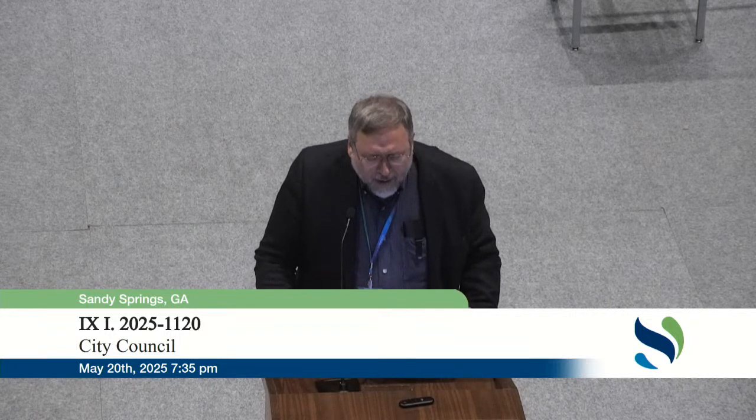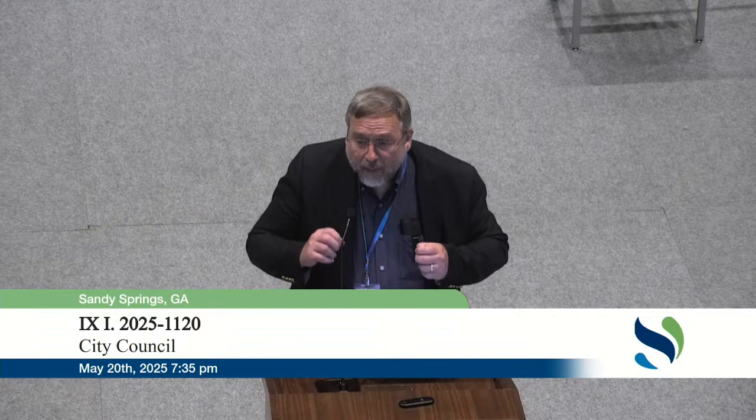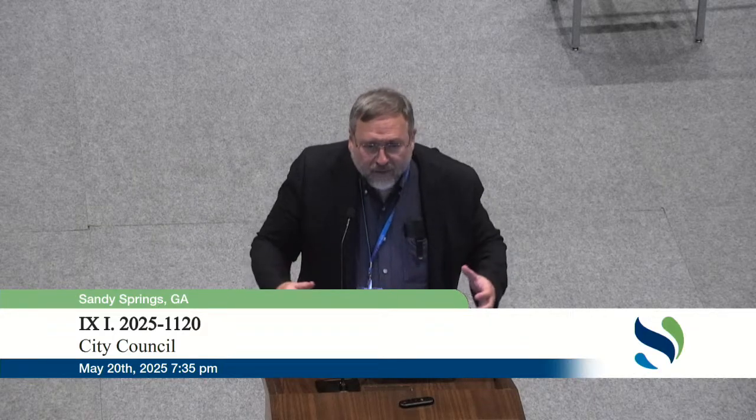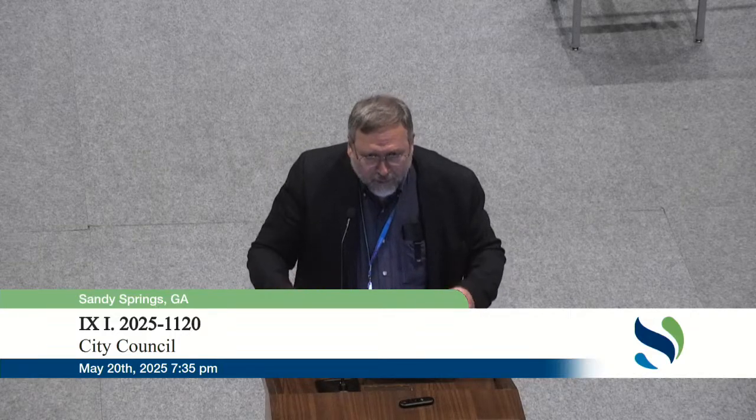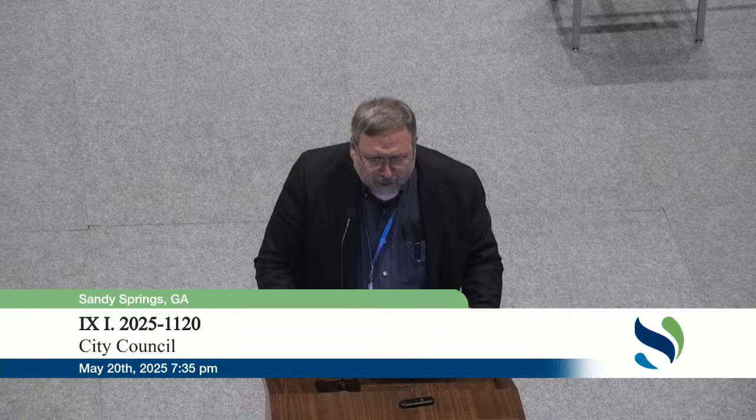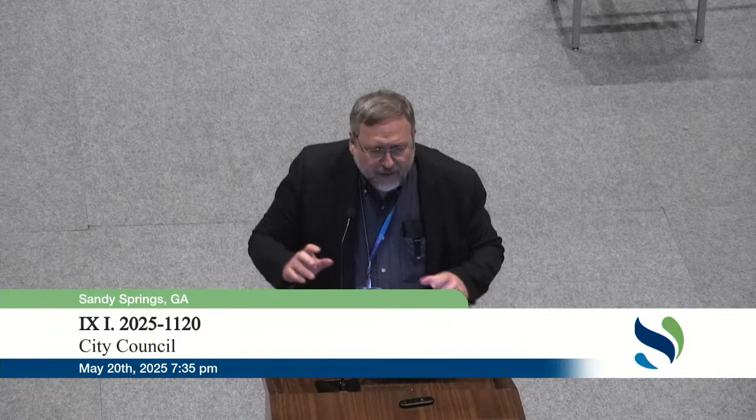However, this year we had a little something odd happen. We've had enough accumulated capital contingency to be the last portion of funding Path 400, Segment 2 of Path 400. And we utilized that at the last meeting. We utilized that $2 million to plug in the last portion of that for the city match, the grants that we were being awarded. This took our capital contingency down to just right about 3%, a little bit over 3% of our current open projects.